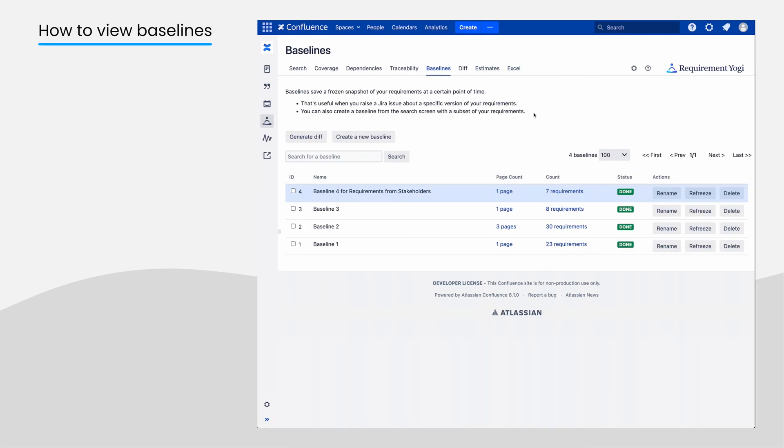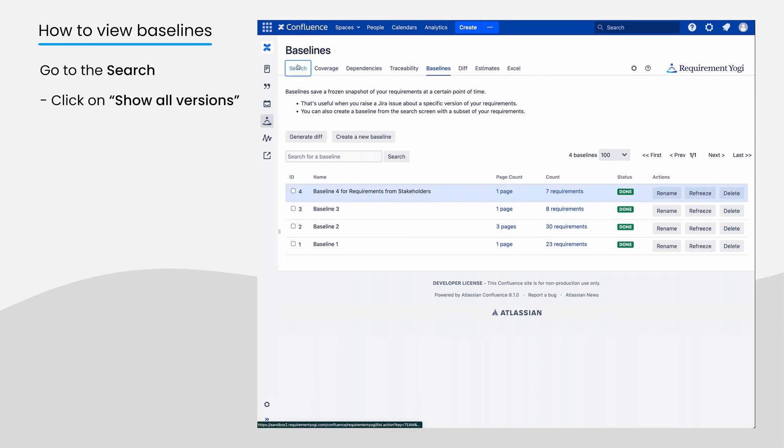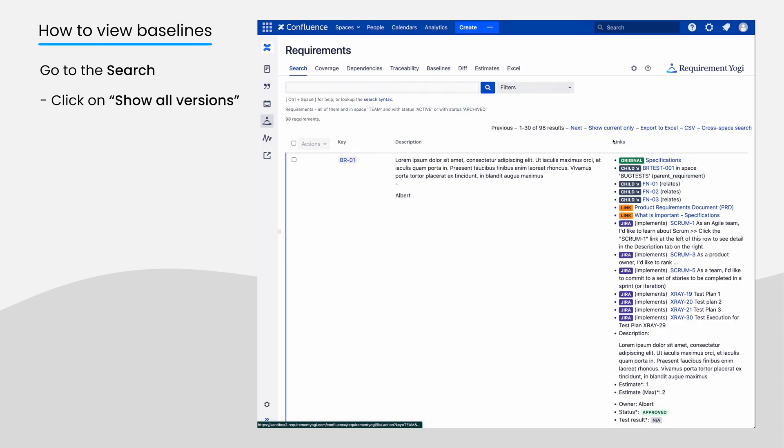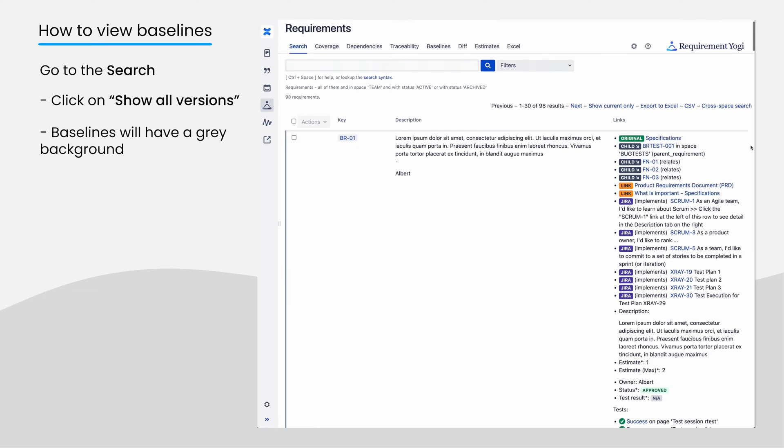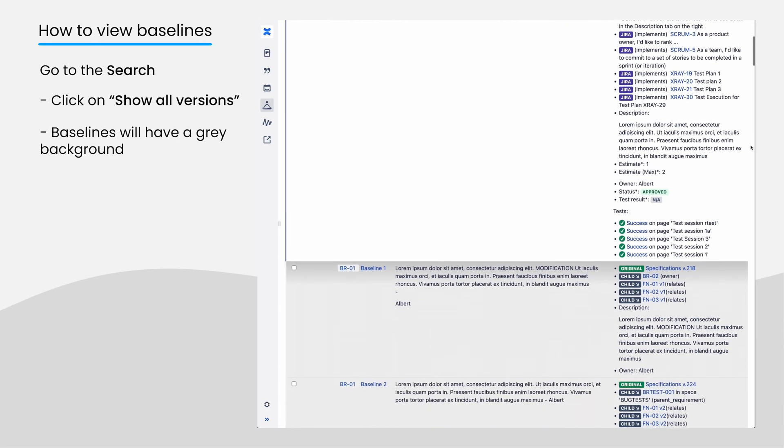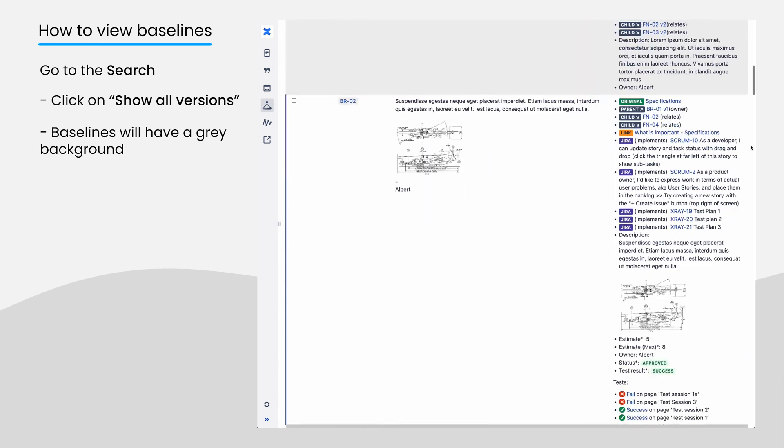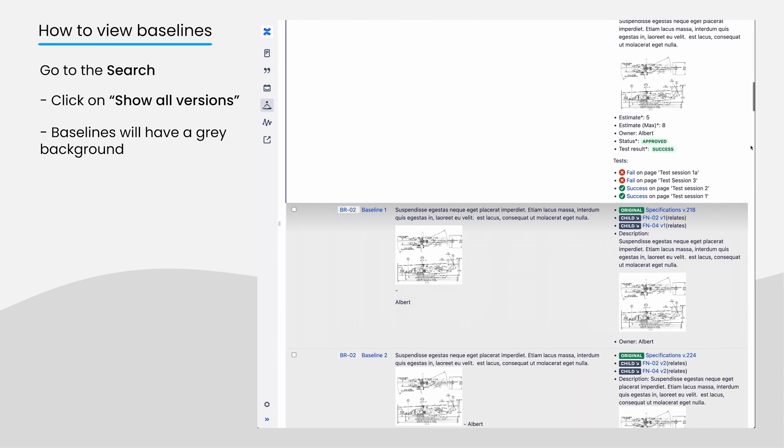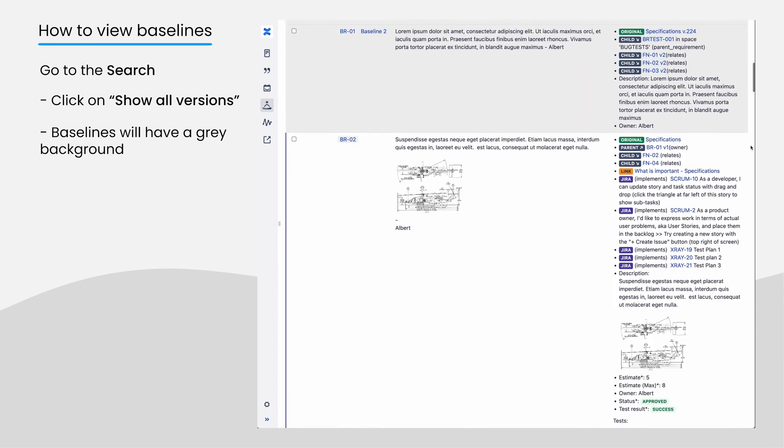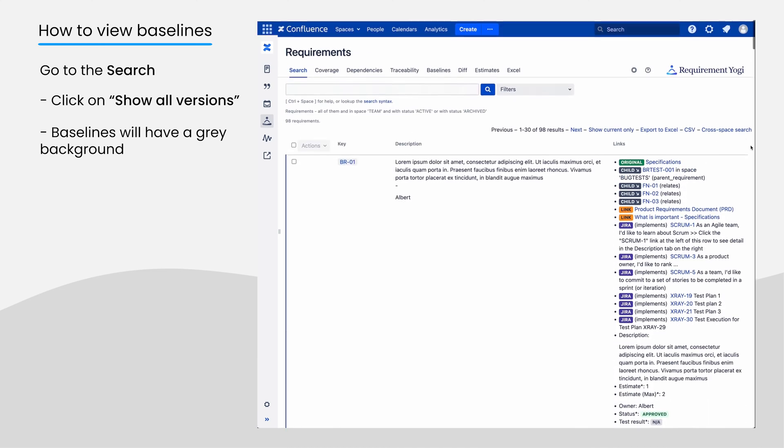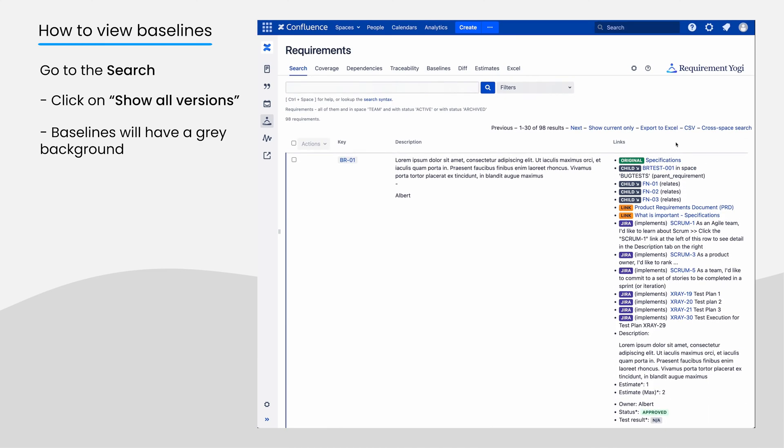Now, let's see how to view a baseline. Once a baseline is created, if you click Show All Versions in the search, it will display the most current version at the top, and all archived versions below, with a subtle gray background. This is the proof that we keep a copy of requirements at a given point in time.